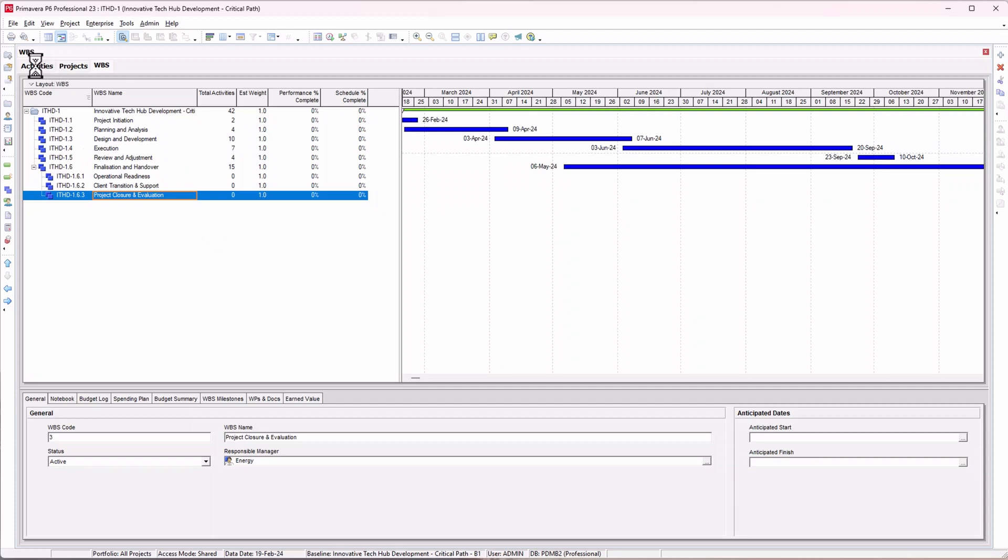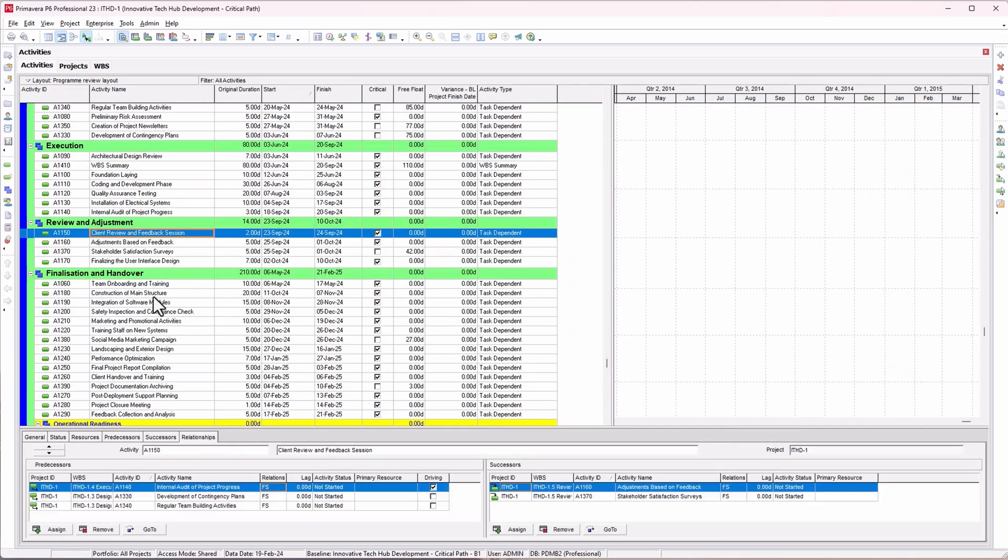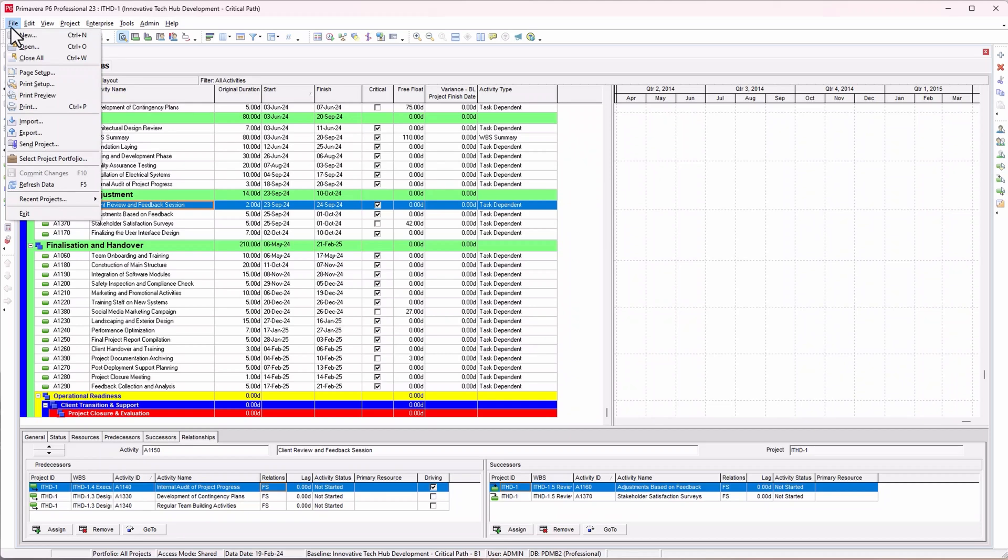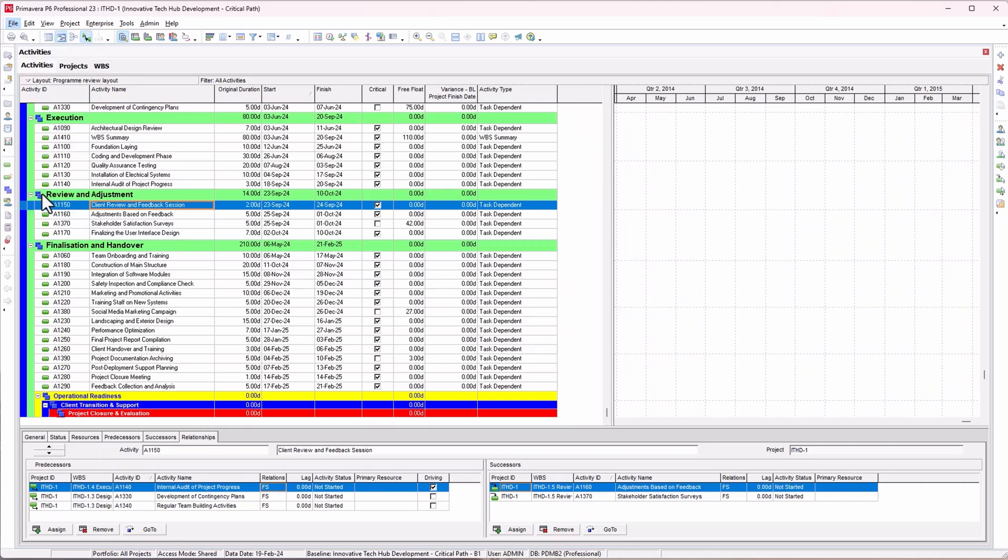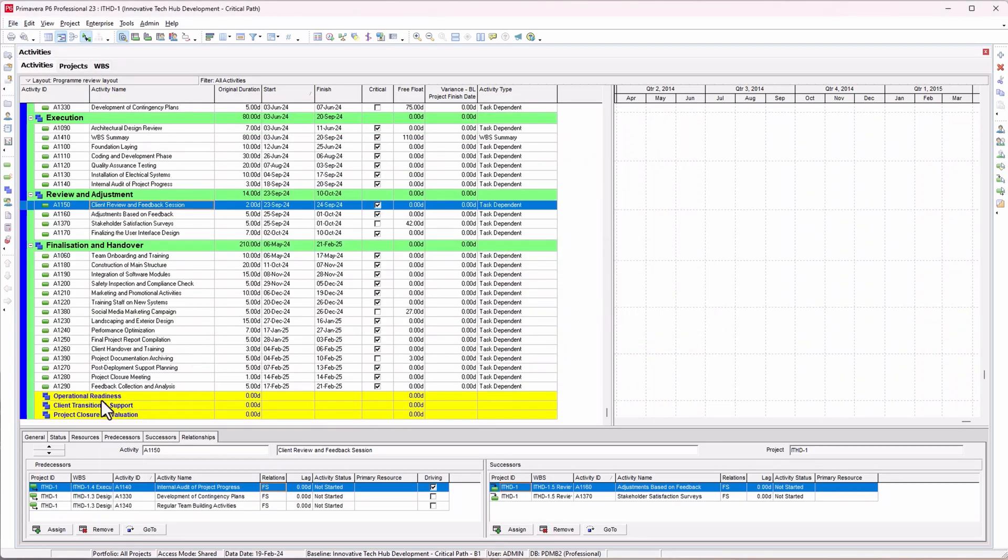Go back to your activity view. If you see that your WBS has been aligned in WBS view but is still showing misaligned here, go to File and refresh data. When we refresh data now, we'll see all our WBS are on the same line and have the same color.